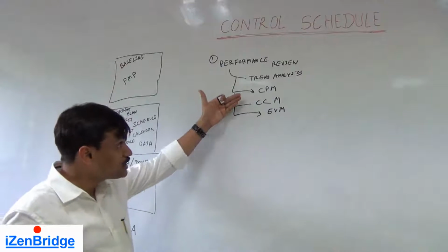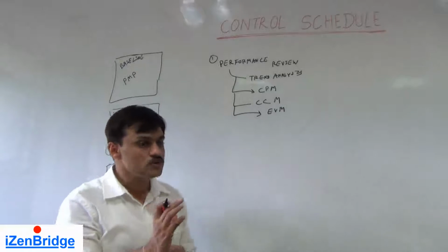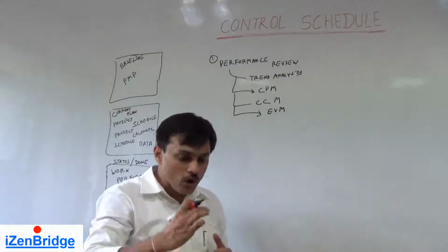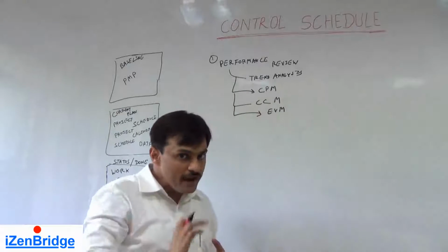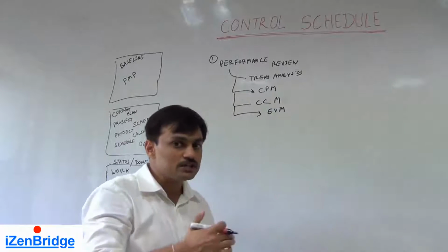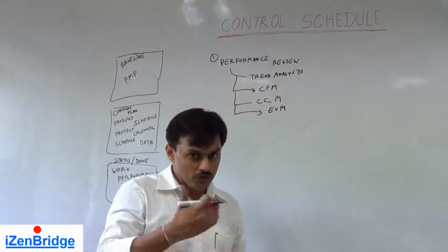By looking at the critical path or critical chain method, we can identify the performance of the activities which are on the critical path or the critical chain, because delaying those activities reflects the delay of the complete project schedule. So we can look at which activities have a possibility of crashing or fast tracking.